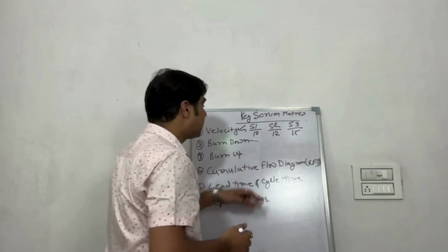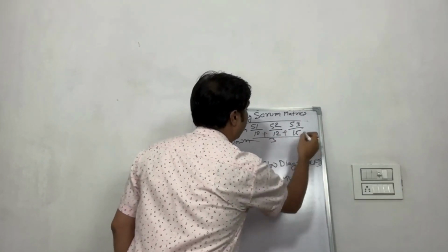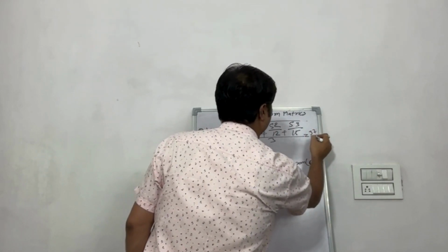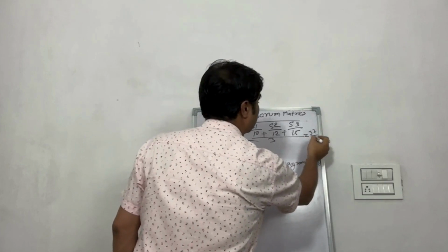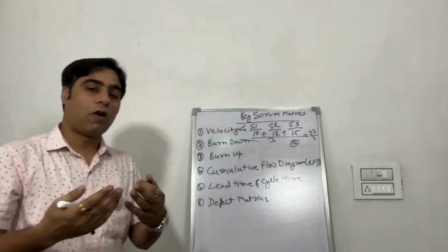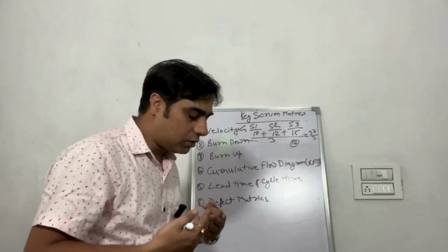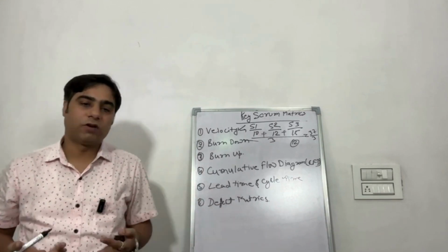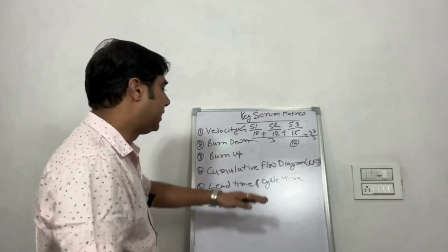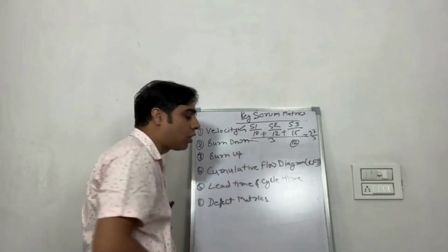So to analyze the velocity, what you have to do is just average out all these numbers. 10 plus 12 plus 15 is 37, and 37 by 3 is about 12. So 12 is the velocity of your team. Whenever you analyze the velocity, take whatever sprints the team has completed, and take the average of that. It will become your velocity.